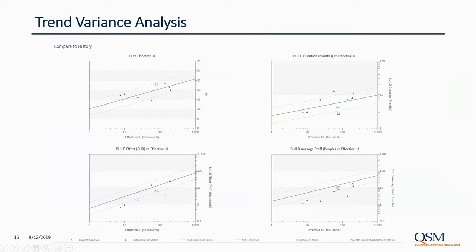If they're proposing to operate at a high level of efficiency, then that would mean maybe accommodating somebody's desire for a shorter duration and using fewer people and keeping the cost down. In terms of a way to interpret, if you look at these examples of average trend line plus or minus a standard deviation, it looks like the lines of a road. And you can use that metaphor as a guide to what's reasonable. If you're on the road, you're probably okay.